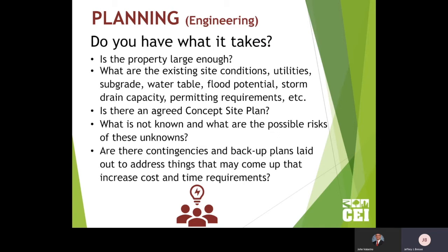But at that time, you also need to discuss what you know and what you don't know. And here's where the unknowns come in. At the end of step A, there are still more steps to go. You can't know everything. We've got a lot of experience, and these jobs we've done in the past, nearly 300 of them, can help you know maybe what you don't know, what you can't know, and what you've got to do to build in contingencies and backup plans. And therefore, as you move forward, even though you don't know them, you have a plan to deal with them once they become known, and how to handle them and make sure that there's enough to cover you either way.